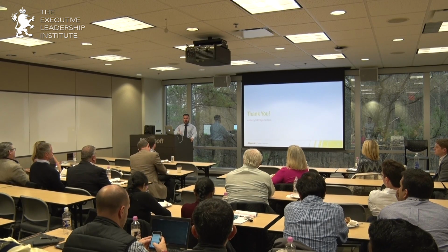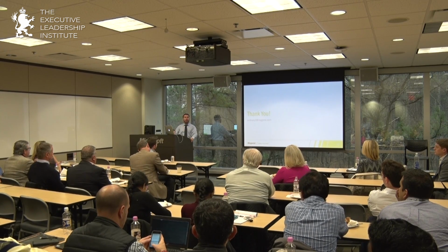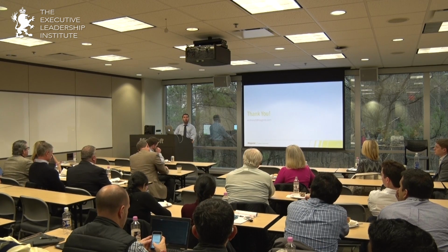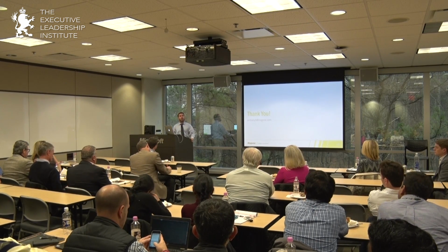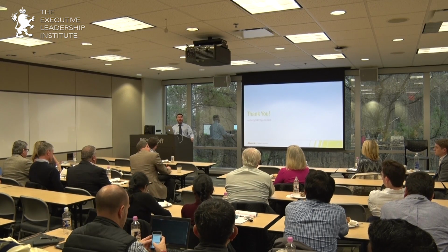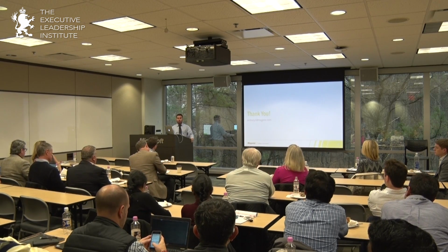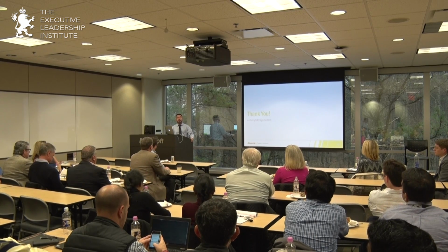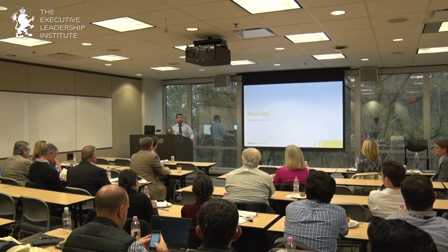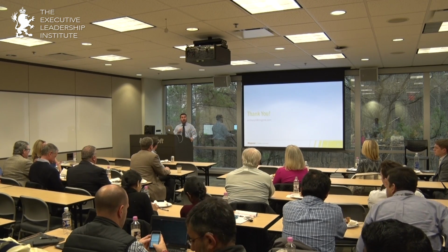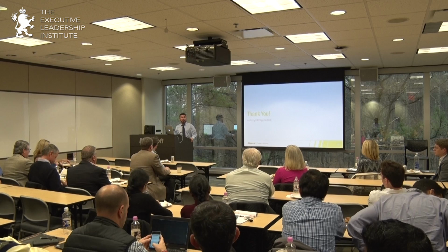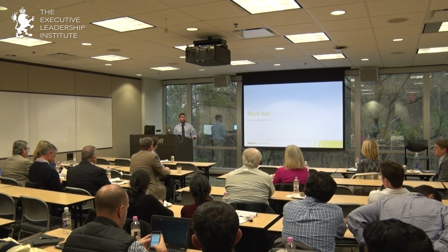When you're imagining what that project is going to be, sometimes you might say, based on access to users, or data or information that we don't have, or changing requirements, we might not be able to approach this in an iterative fashion. We need to take the time and write out a BRD, our business requirements document, capture everything and have that solid roadmap. Agile is not a replacement for waterfall, it's an alternative, right?